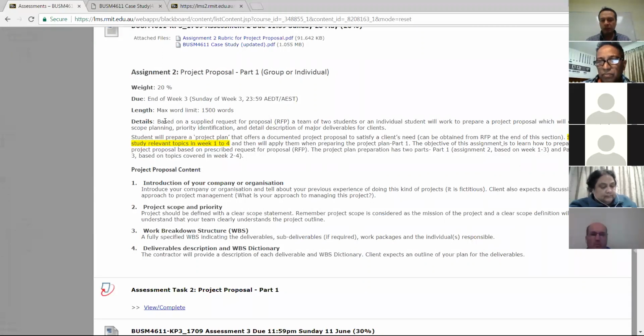And you explain the project scope. You look at the RFP and find what the scope of the project is. You will write it down. It includes the project start dates and finish dates that you will consider, and the price of the contract as well.